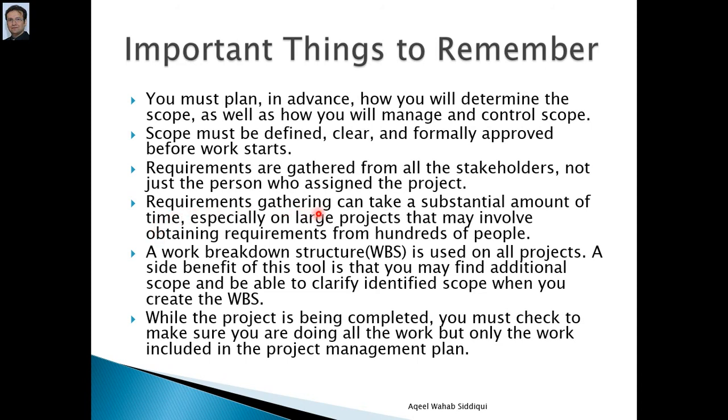Requirement gathering can take a substantial amount of time, especially on large projects that may involve obtaining requirements from hundreds of people. So you must understand that this will take time, and obviously you will have to involve all your stakeholders. If you do not identify your stakeholders right from the beginning of the project, you will face many changes when you find out about any stakeholder later on in your project. Obviously he or she will ask you to make many changes according to his or her own needs.